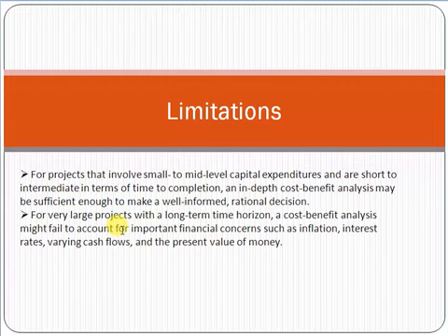Why? Because normally it fails. Studies show that in very big projects, cost benefit analysis is not a very good technique, because it fails to account for important financial concerns, for example inflation, interest rate, varying cash flows, and the present value of money.